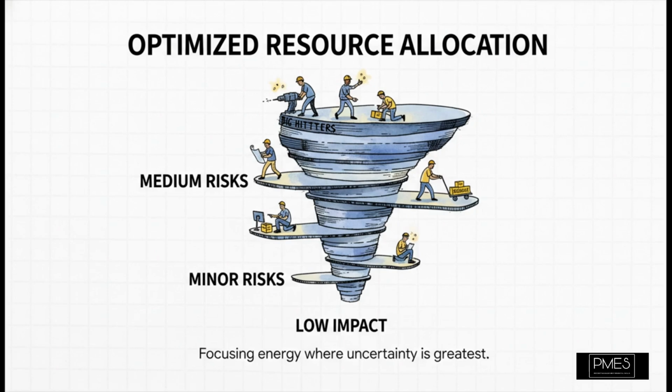Let's dig into sensitivity analysis for a sec. The entire reason we do this is to know where to focus our limited time and money. It spits out this awesome visual called a tornado diagram, and what it does is rank all your risks by how much they can mess up your project. This is a game changer because it lets you laser focus on the real big hitters instead of wasting energy on a bunch of small fry risks that don't really matter.